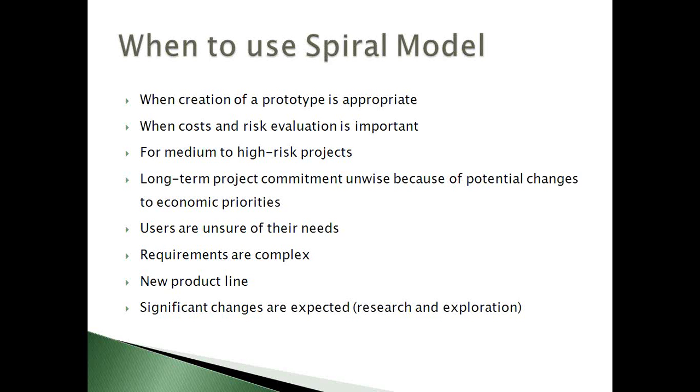And if the client business is related to something like financial transactions, where there is a chance of a number of risks, in that scenario we are going to propose the spiral model, because in the spiral model the main theme is that we spend more time identifying and resolving the risks of the project.